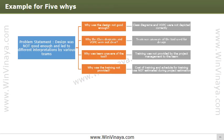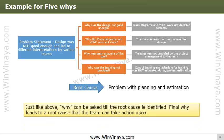Then ask: why was the team not provided with training? The reason may be poor planning and estimation, which did not have a schedule or budget for training. This helps in arriving at the root cause. Most of the time, five whys is sufficient, however, sometimes more than five or even fewer than five iterations are enough.